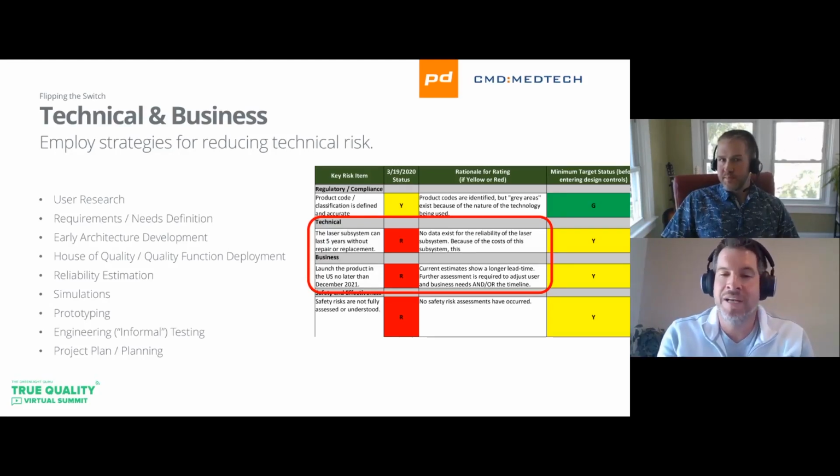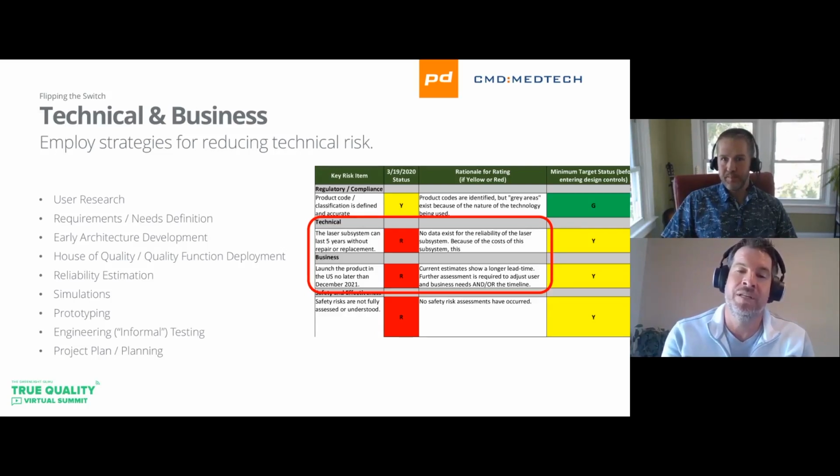For example, plastic part injection molding using existing materials and processes does not represent a very high risk, and it's not necessarily something that we need to solve early on before we lock in. But if it's invention on the critical path, if it's a novel design or novel technology or novel application, that's something we're going to want to spend a lot of time on and dig deep into. At Priority, we have a lot of engineers and designers, prototype and soft goods specialists who work in this early feasibility phase to make sure we have articulated that it is feasible and we have a pathway to success before we flip that switch.